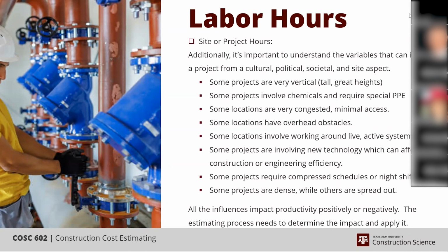Are they in a live plant, or working in and around a live plant that has chemicals in it, which requires special PPE? I know that whenever we have to break open lines for tie-ins, they may have to be in a full suit with respirators because we don't know what's in the line, or they know that what's in the line is very hazardous to your health.